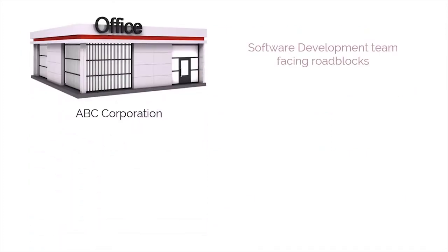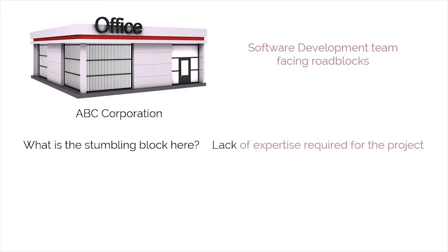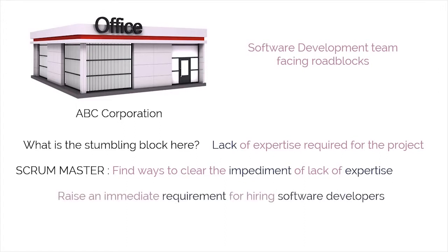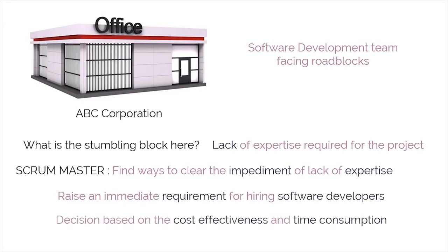To clarify, here's an example. This is ABC Corporation. The software development team at ABC is facing roadblocks lately because they are unable to live up to the set standards of a project in terms of quality. The stumbling block is a lack of expertise required for the project, which in turn leads to delay. This is where the Scrum master pitches in — the Scrum master will focus on finding ways to clear this impediment. The Scrum master is either going to raise an immediate requirement for hiring software developers with the required expertise, or make an arrangement for training the existing staff, making a decision based on cost-effectiveness and time consumption.